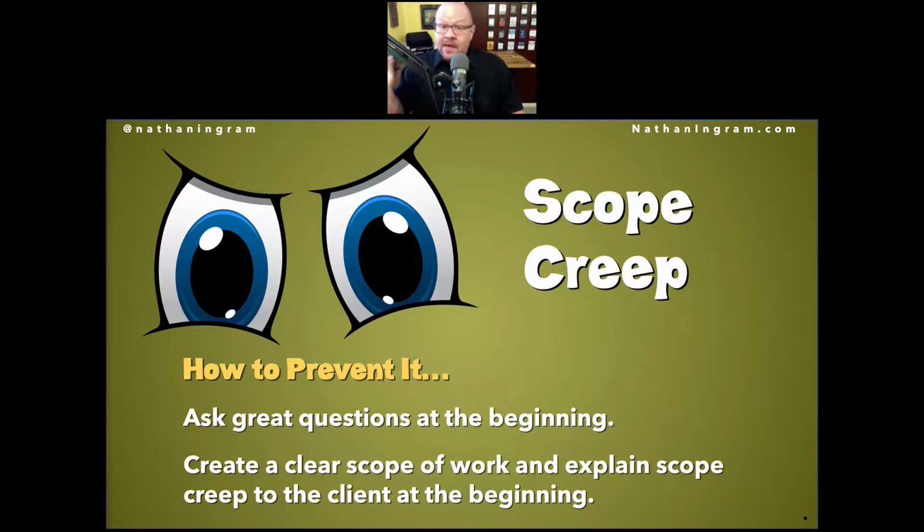I talk about, look, it is normal for you to see things, or for us to think of things, as we're going through building the project and our understanding evolves. There may be extra things that we want to do or add to the site, and we love to do that. So we can either do that as an addition to the scope of this site with an additional cost on the final invoice, or maybe that's just a phase 2 project that once we get this site launched at this price we agreed on, maybe 3 months later we come back and add this extra feature, and it's just a little extra project cost. So it's all about making sure that you and the client are on the same page at the beginning.